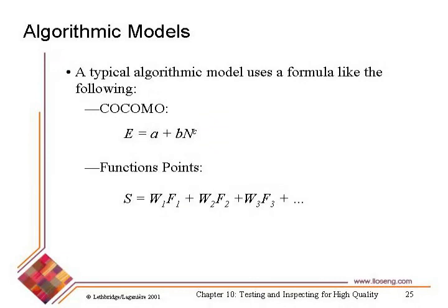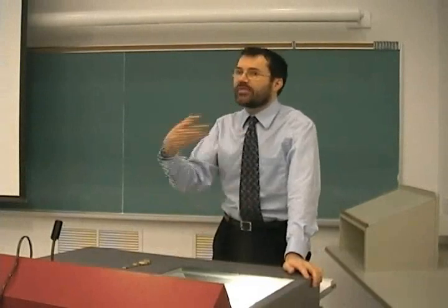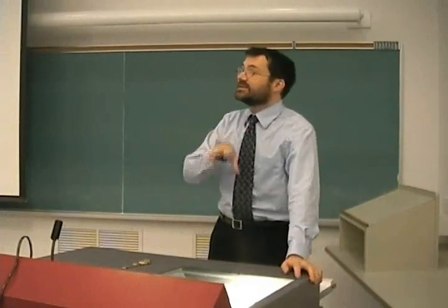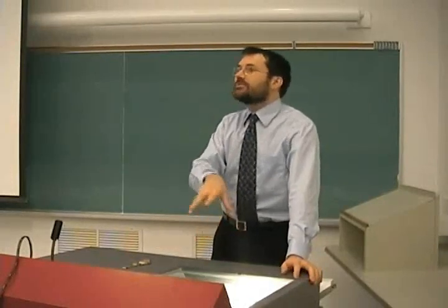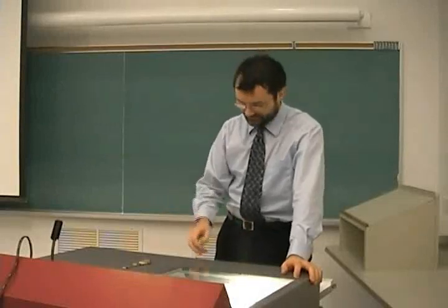The function point model is a model that weights together a number of factors, with a number of weights, the W things, and gives you a size estimate in units of function points that you can then convert to lines of code. Okay, so these are things that you will learn about later, but right now the important thing is to understand that these things exist, and that if you end up doing estimation, you should learn about these techniques.